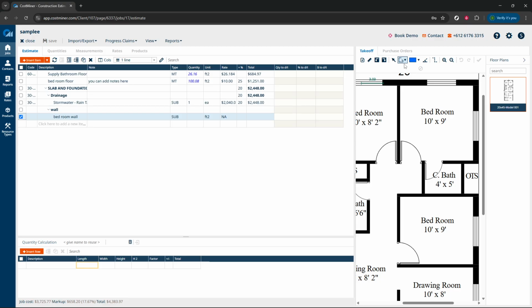For instance, let's consider you want to measure the bedroom wall for painting. Start by using the length tracer tool available in the interface. This feature allows you to outline the wall by tracing its length precisely. Locate the starting point of the wall and drag to trace the wall's contour until you reach the end point. When you've reached the conclusion of the wall, click on the endpoint and press enter. This action will add this measurement to your project, and you'll be able to see it appear in the bottom section of your screen for reference and further computation.